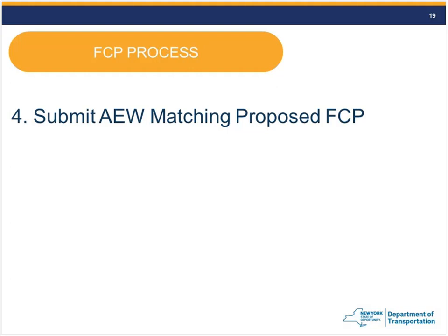Perfect. Yeah, we have a few other questions, Mike. Significant change. Is renegotiation mandatory when thresholds are exceeded? Yes, but you do have the ability to retain the bid price if the contractor chooses to accept that. Yeah, and we're going to really go over that next week. Specifically, when you exceed a threshold, what do you do? But there's many times when the bid price is still acceptable and you can continue with it, but you need to justify it.